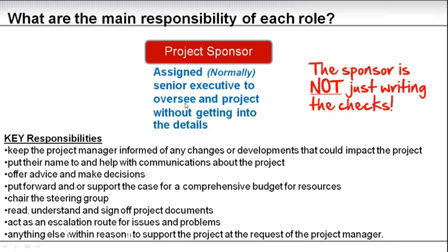as you need. And remember, as the project manager of the future, you are going to deliver value, manage value, realize value. You really need to have a close relationship with your project sponsor, and the project sponsor needs to be engaged. If the project sponsor is not engaged or not interested, the project manager might need to escalate this above the project sponsor, because then you are most likely set up for failure.